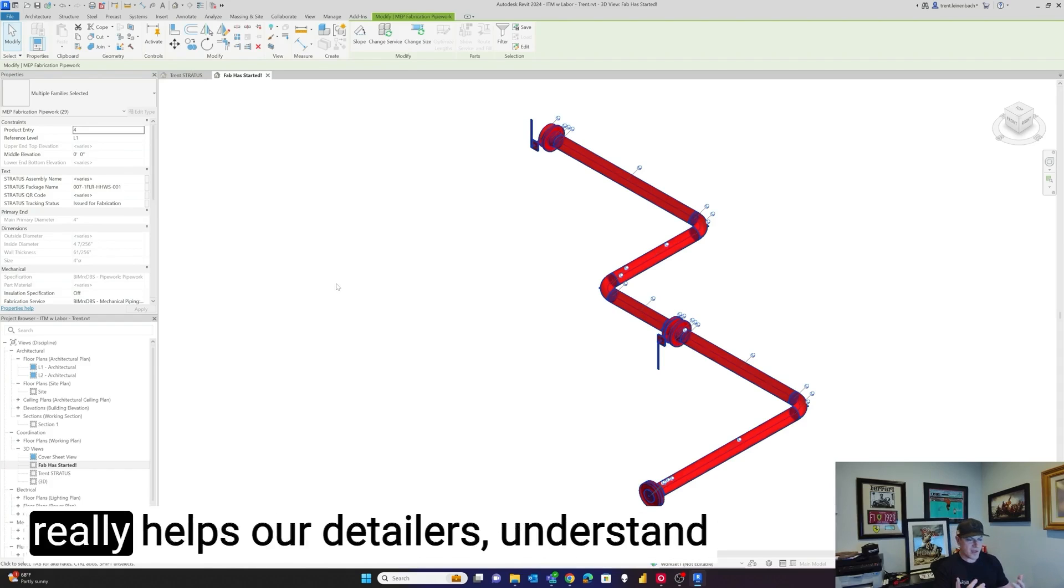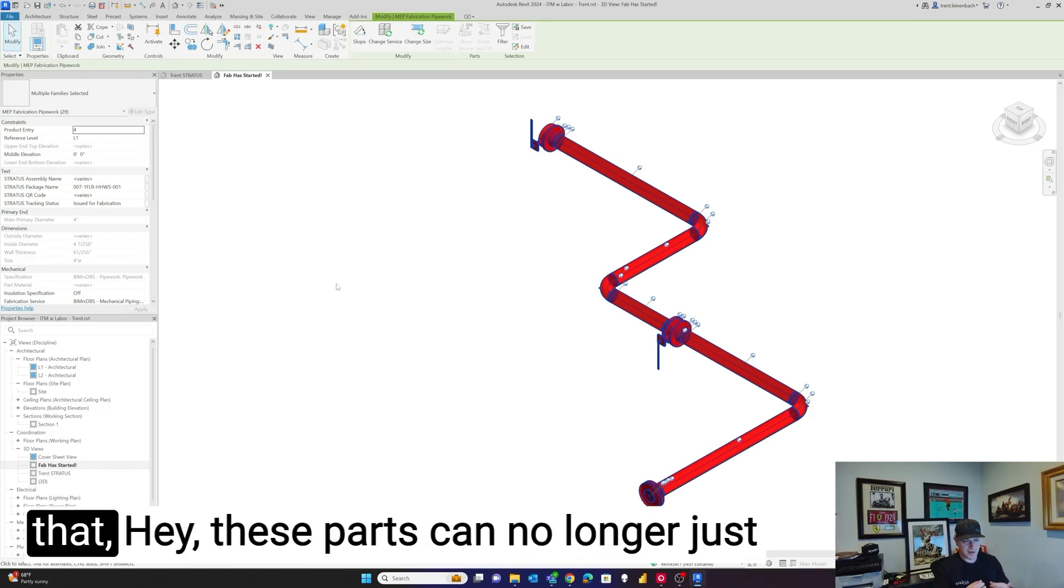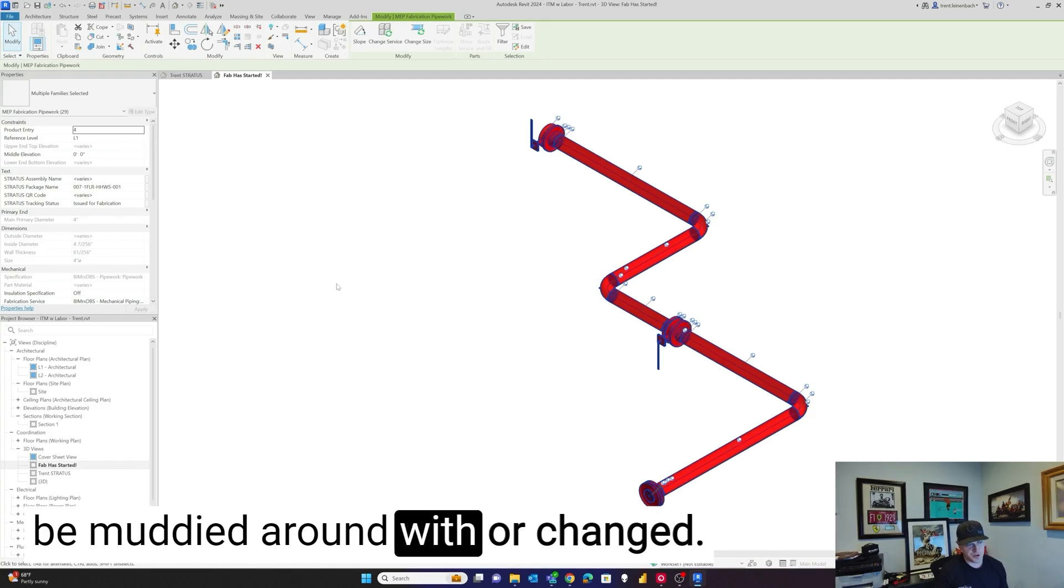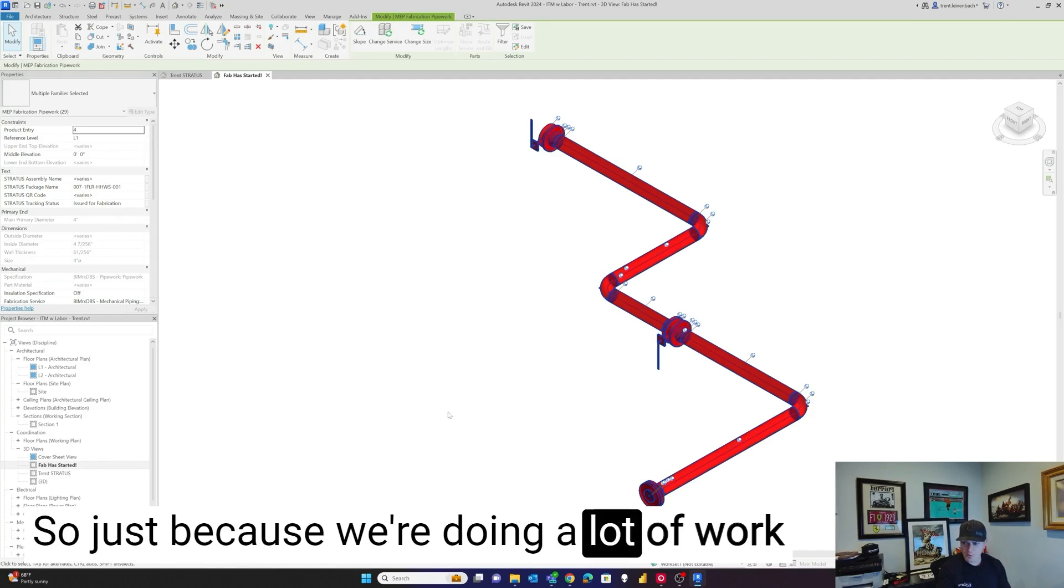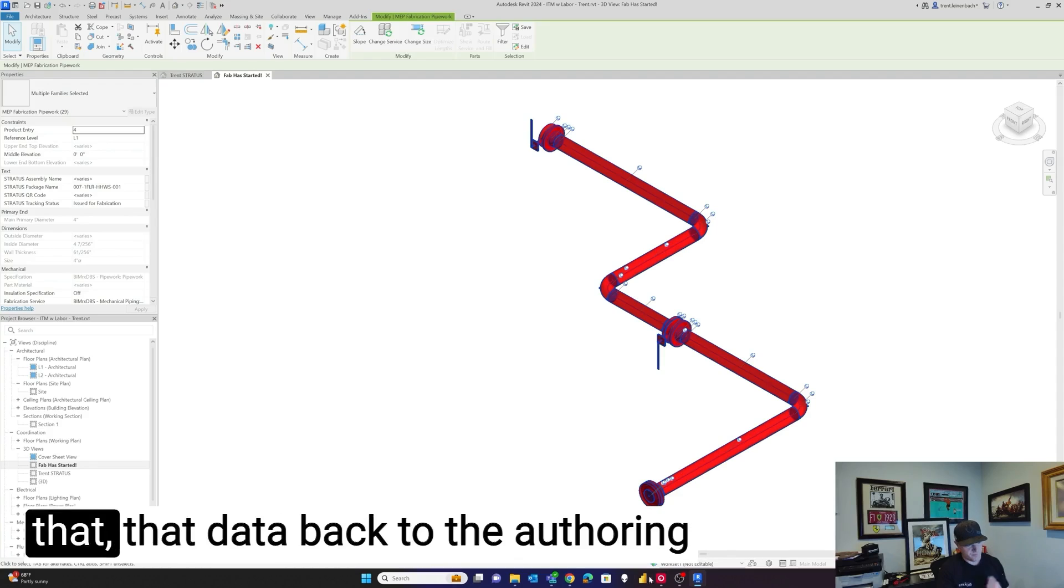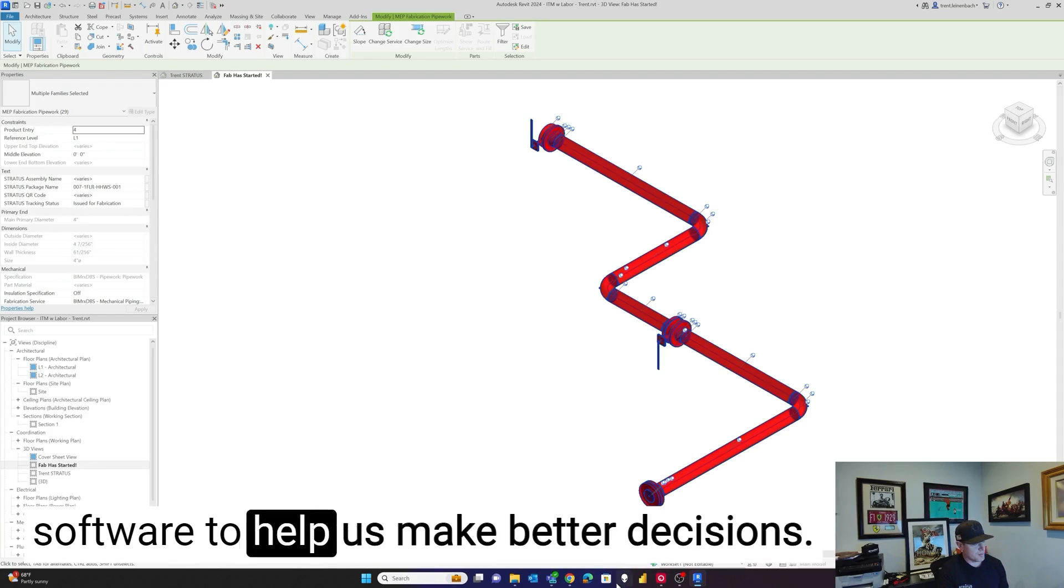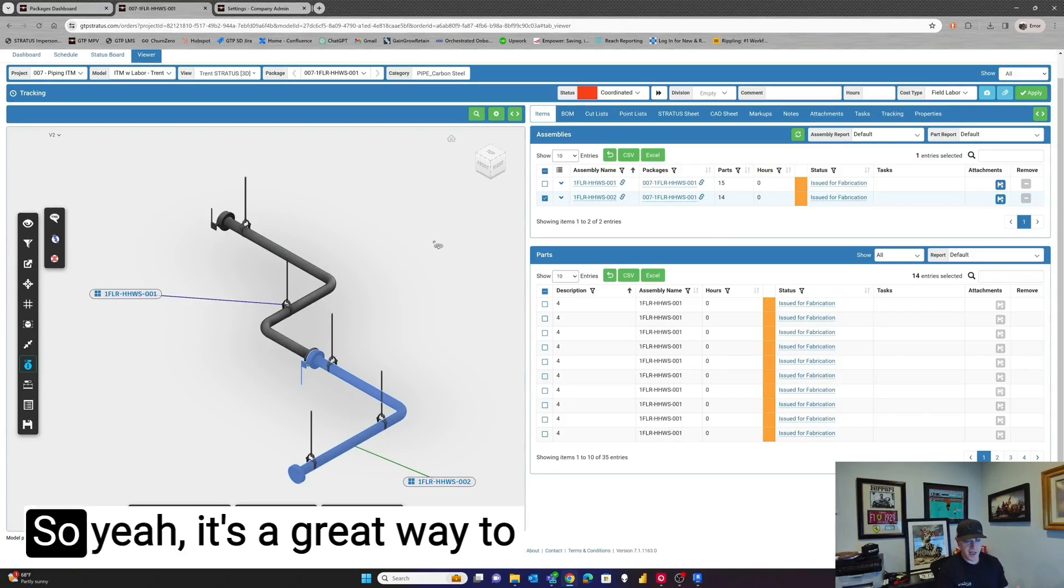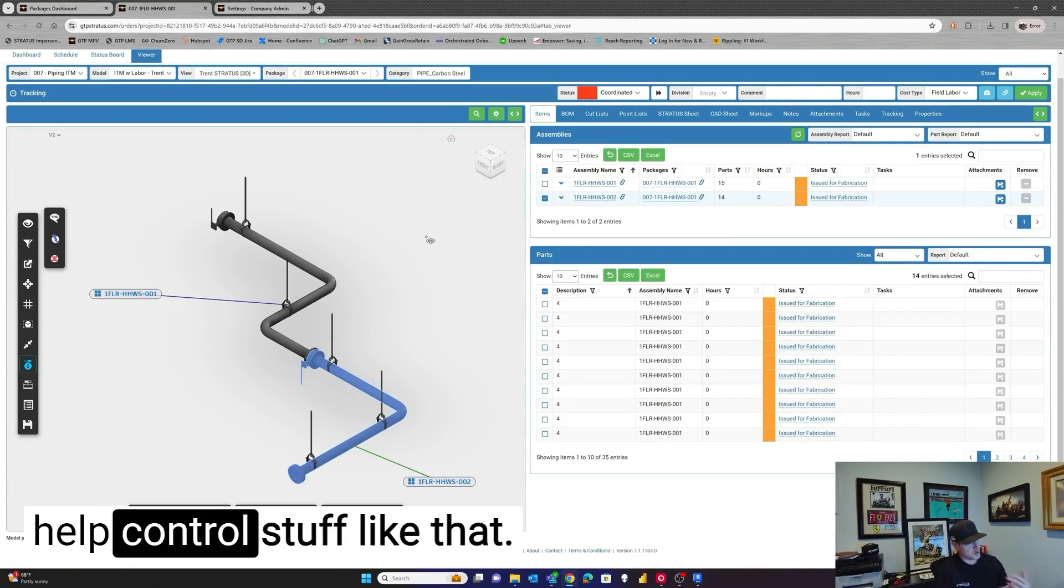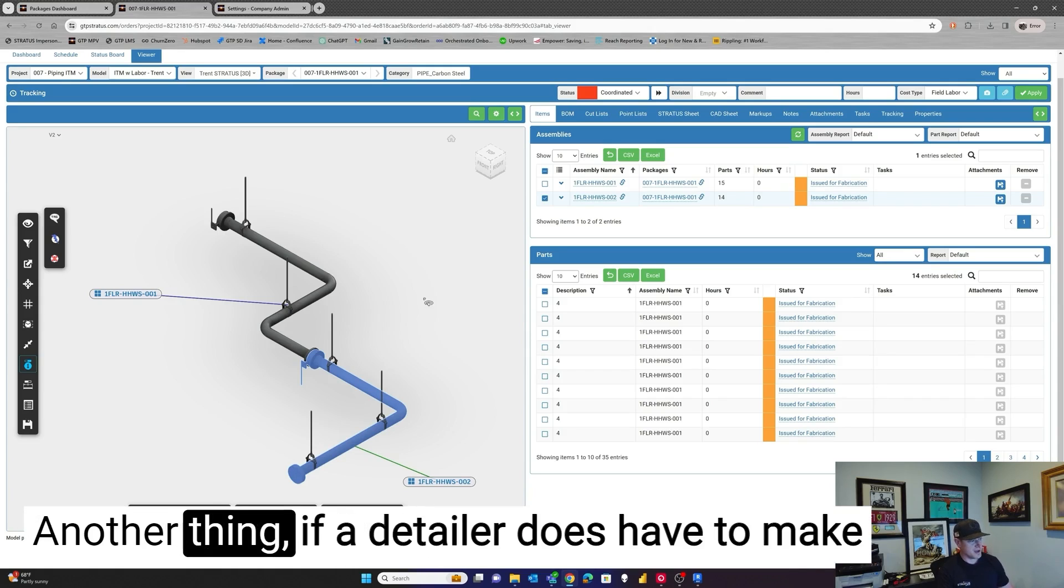But that really helps our detailers understand that, hey, these parts can no longer just be muddied around with or changed. So just because we're doing a lot of work in the cloud doesn't mean we can't bring that data back to the authoring software to help us make better decisions. So yeah, it's a great way to help control stuff like that.